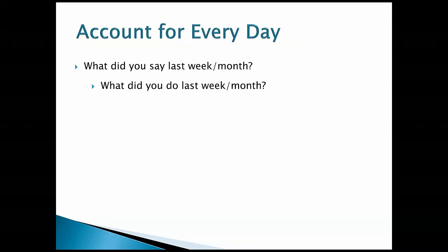What's the date you're going to switch from phase 1 to phase 2 work, right? Or what date is your slab going to get poured? What date are you scheduling for dry-in? Or what are the various milestones? Set up a spreadsheet with those milestones, and you can see as those initial dates start moving out, you can actually start tracking if the scheduler is taking days out of the end to compensate for days they're missing up front, right? Once again, it brings that accountability in there.